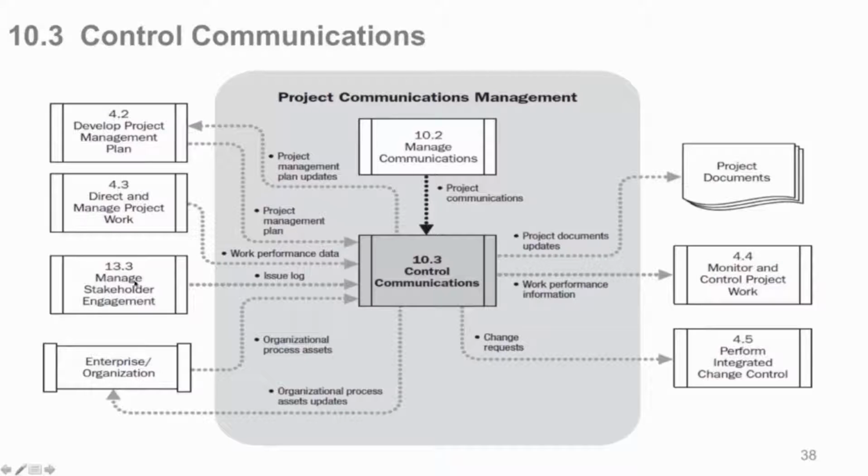We're always talking to stakeholders. So here come issue logs in there, which may affect that. Since we're talking communication context here, he or she may say, boy, I don't like what I'm seeing. I'd rather see this. Okay, that's an issue. You bring it in here, you fix it. You update your project documents, which are your stakeholder register. You put that in there, and you move on.